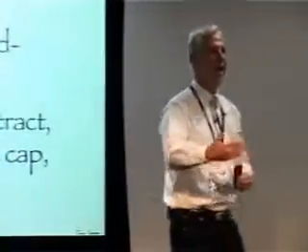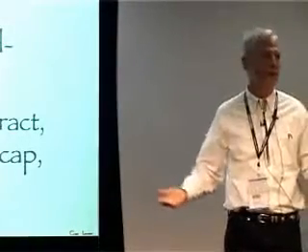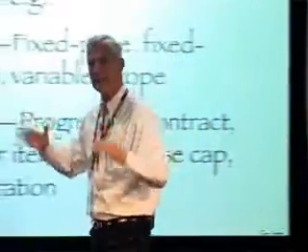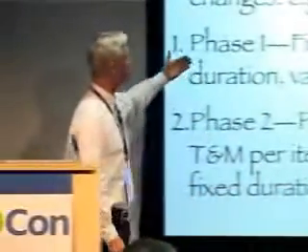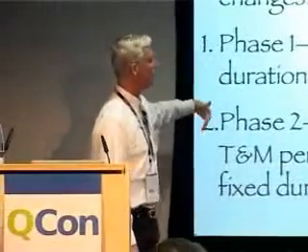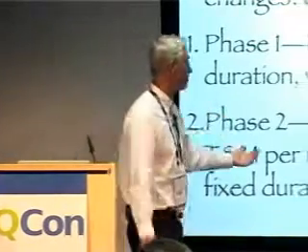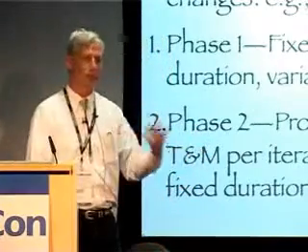Typically, it starts off with the customer not trusting, and so there'll be a contract model which tends to reflect that, like fixed scope, fixed price. And then as trust builds, we'll pre-plan this, and we'll talk about this with the customer, and everyone knows that this may happen. We'll see if we can move later on to more flexible models which are better for both parties, like time and material per iteration with a release cap, and so on and so forth. And that's it. Thank you.